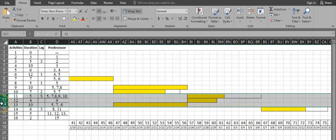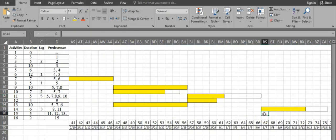Activity 15 has 3 predecessors: activities 11, 12, and 13. Activity 11 is finishing the latest among them, so activity 15 starts from day 67 as well. It has a duration of 5 days: 1, 2, 3, 4, 5.